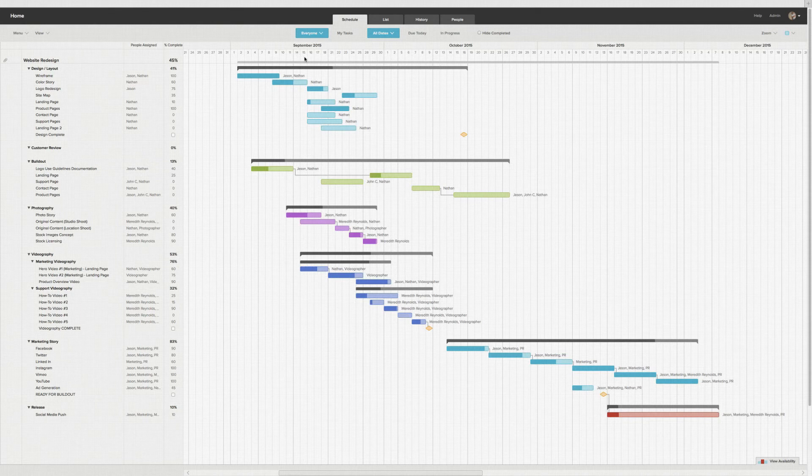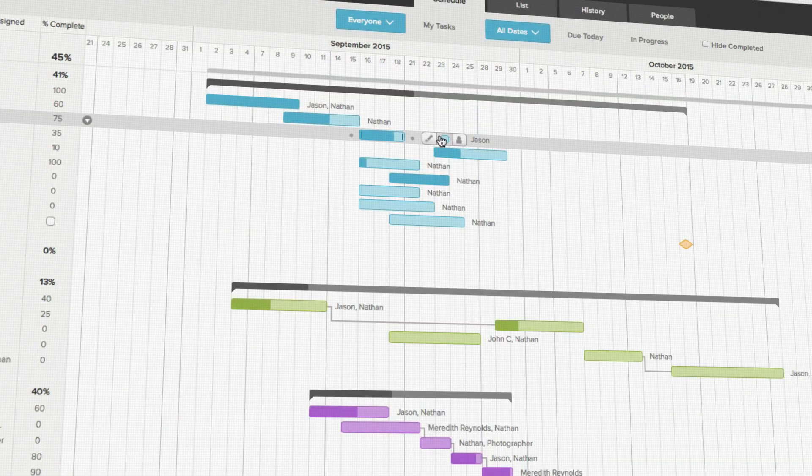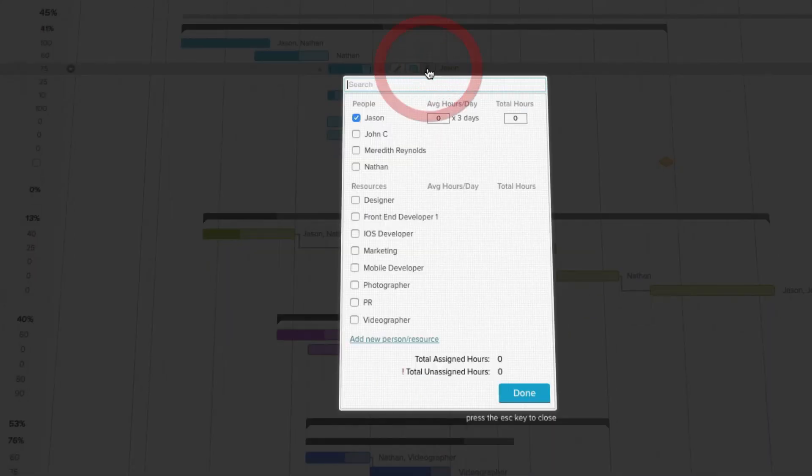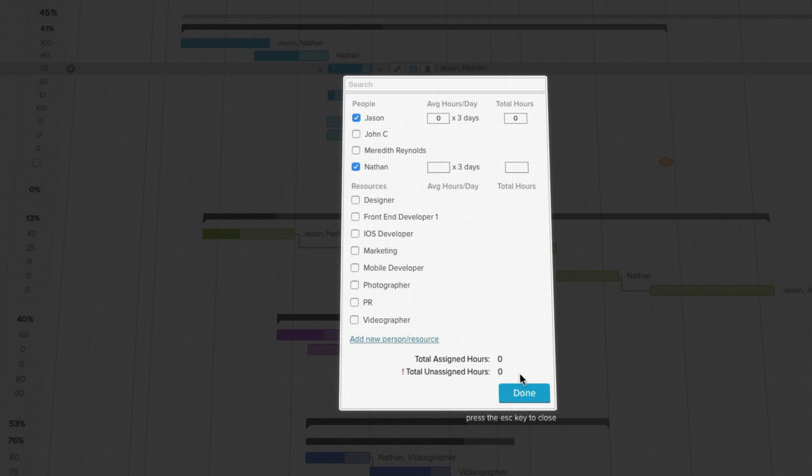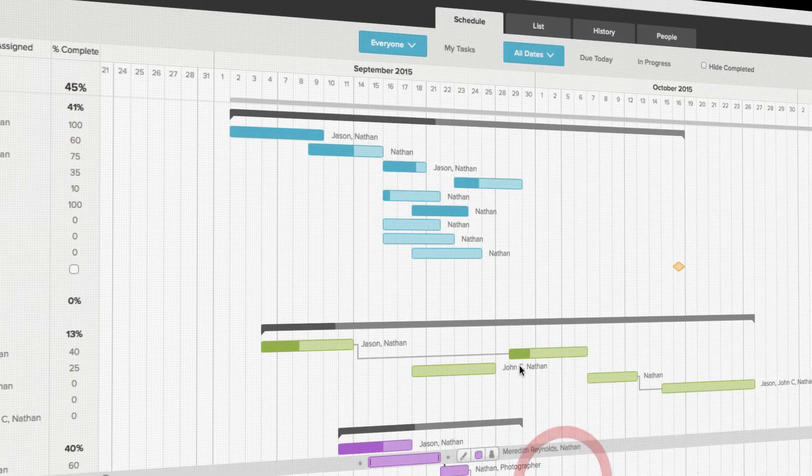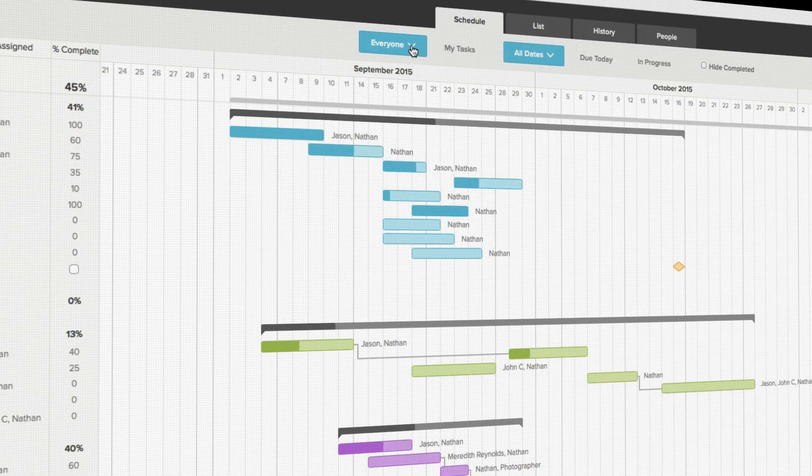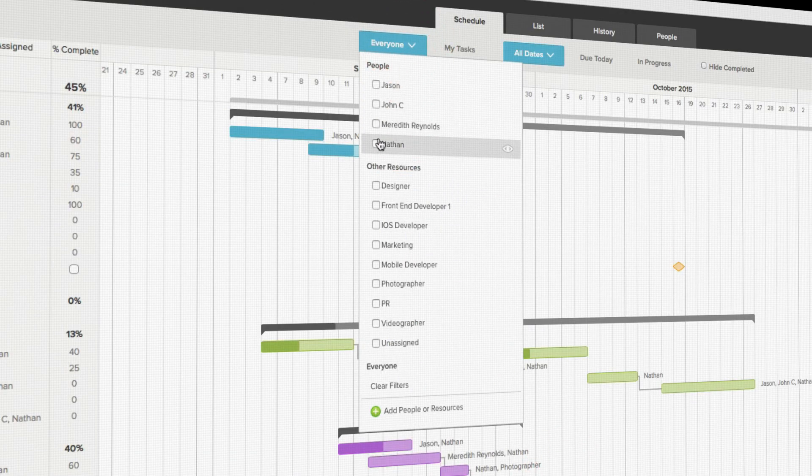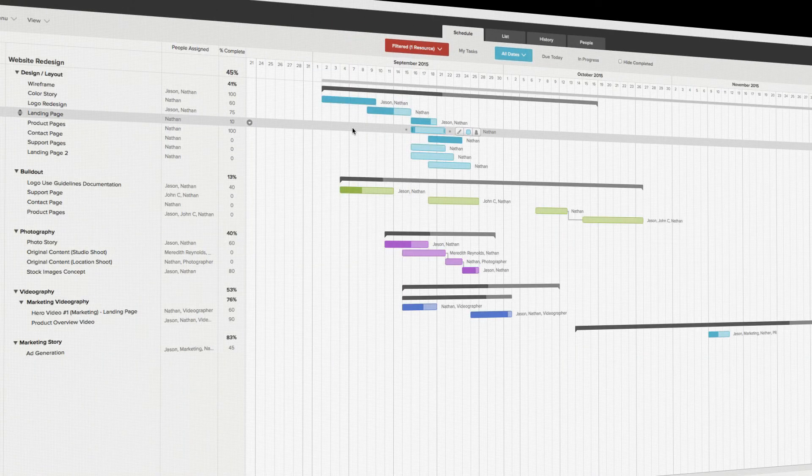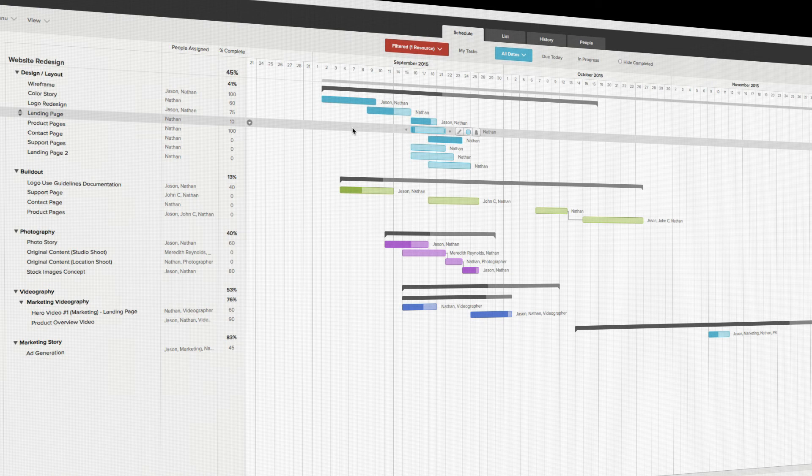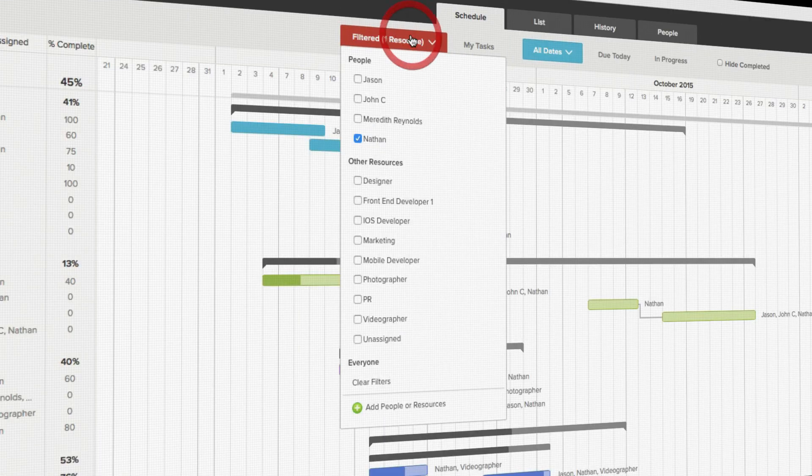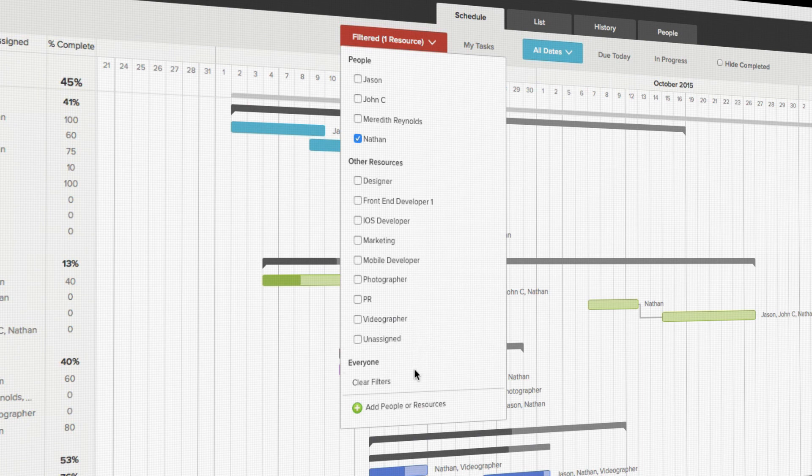After assigning people to tasks in your project, you can see how busy they are either by using the filters at the top to see tasks for just one specific person or resource, or by using the Availability tab at the bottom of your screen. I should note, it's best practice to always make sure you clear any active filters once you're done with them.